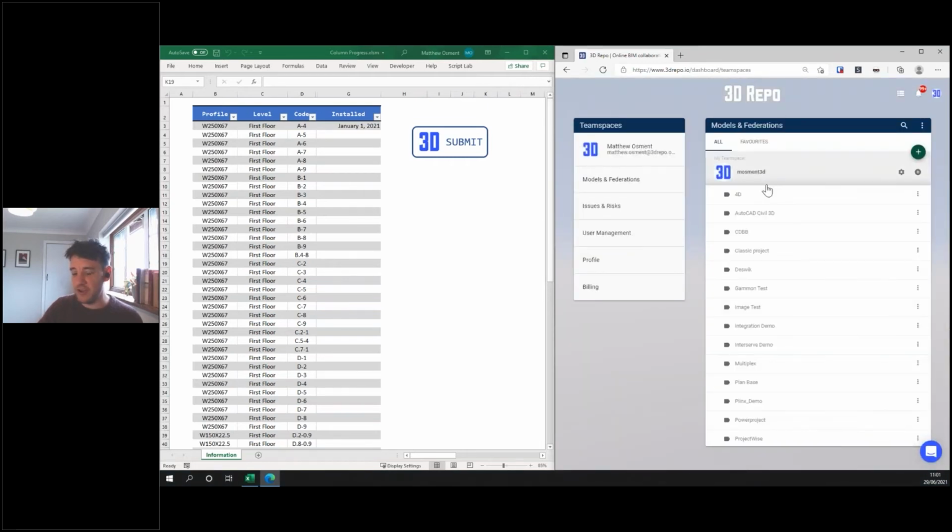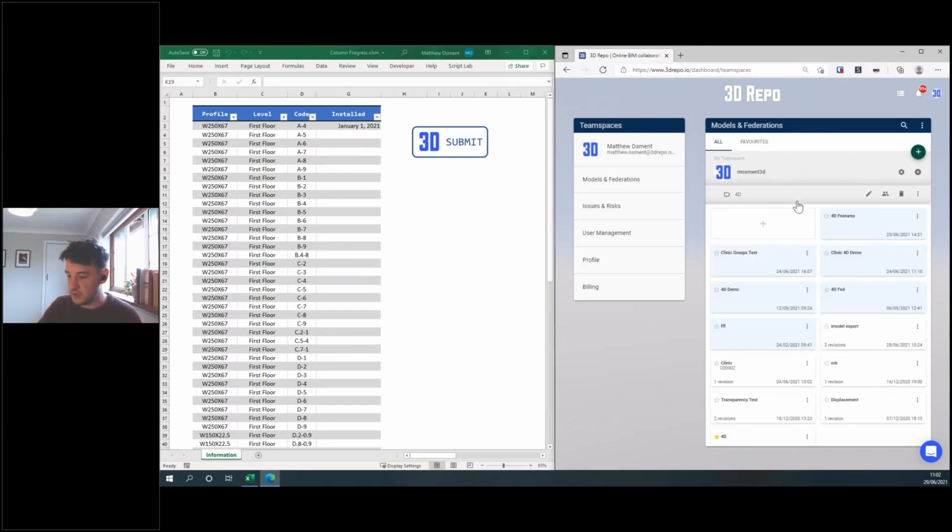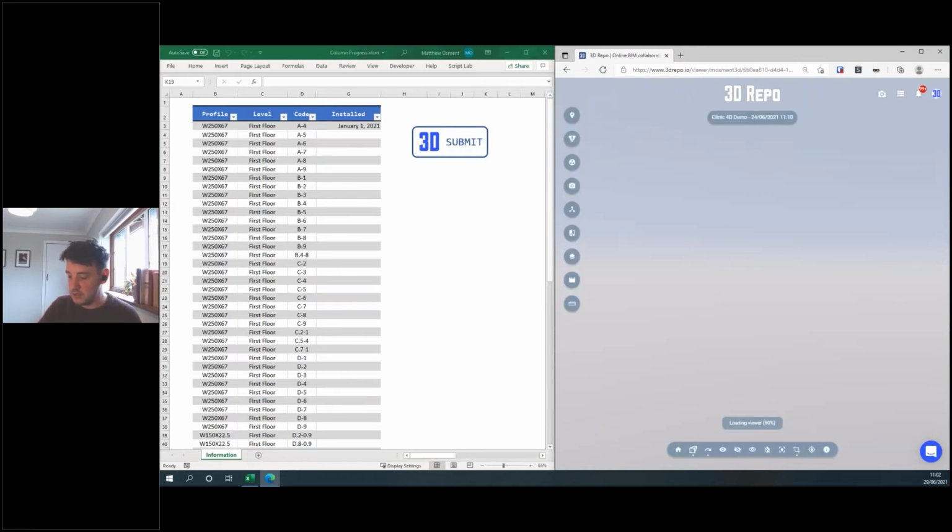So on the left, I've got a schedule of steel columns. And you'll notice that there isn't any particular identifying mark or complicated unique identifier for the BIM model. All I've got is grid references and location and profile. And as long as I've got those three things and those things are present in the model, I can create an integration that highlights the relevant aspects as I cross them off in my Excel spreadsheet. So get this clinic model up here.